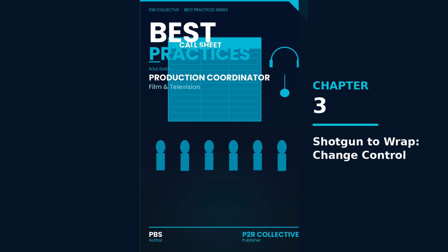3. Confirm affected items. She checks scene 14 crew needs, VFX team and camera pickup, location access window for the pickup, talent call dependency, if talent is only needed for scene 12 or both, and prop continuity notes for the product setup.